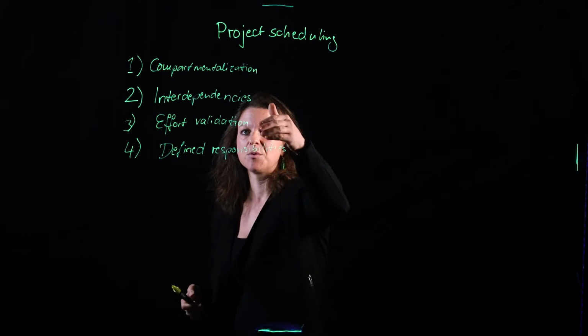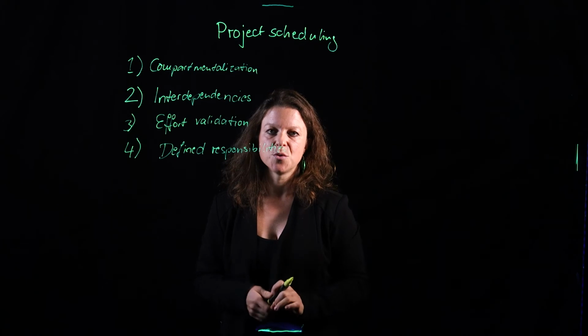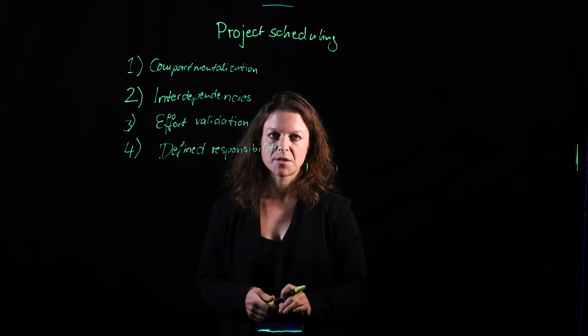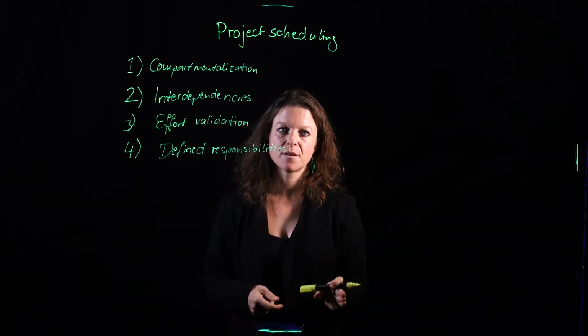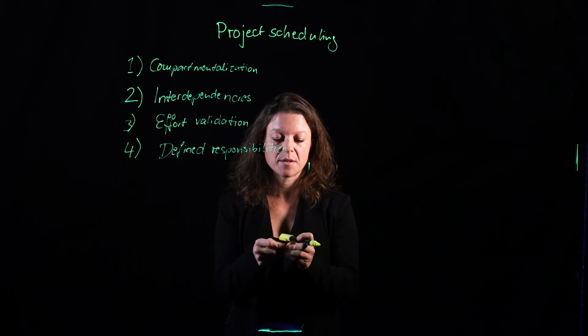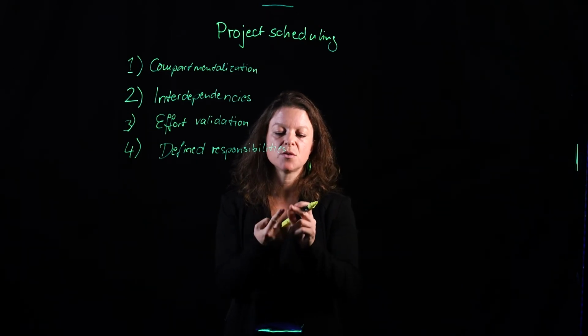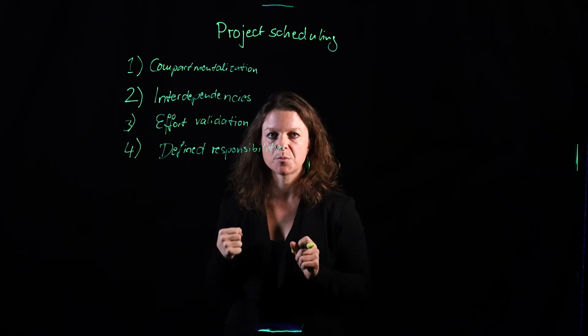For anything I define up here, I've got to tell who's going to do the job, who is responsible for this particular task. And that doesn't mean that there is only one person that will get it done. They may have a whole team under them, but there needs to be one person that holds the responsibility.